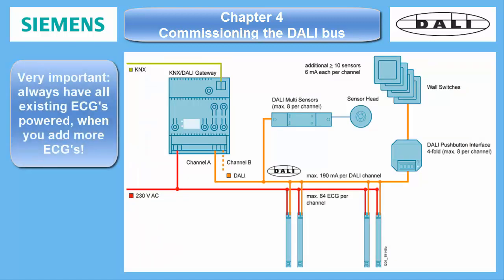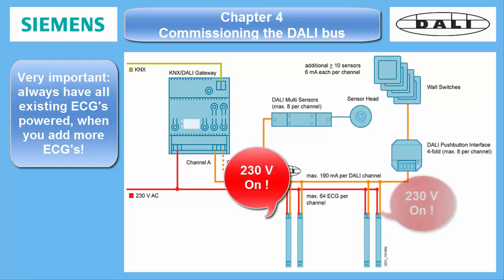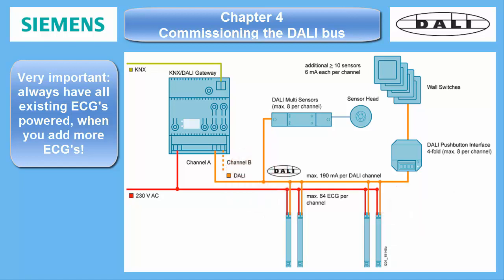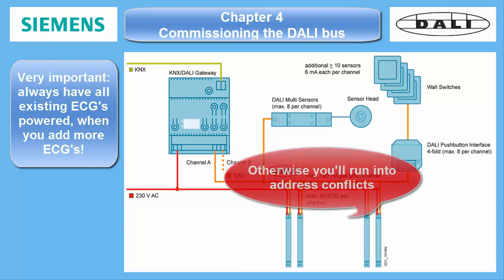Very important! If you aren't able to perform the commissioning for a DALI line in one run, always make sure that previously commissioned ballasts are powered when you extend the line later. Otherwise, the discovery algorithm will reassign the short addresses of the not-found devices to the new ballasts, causing colliding short addresses.